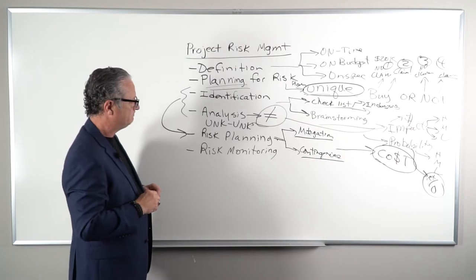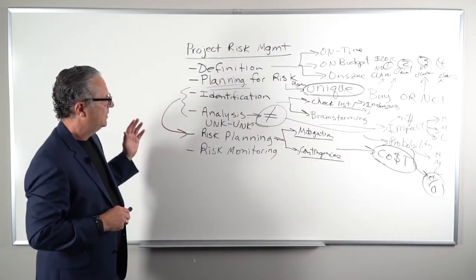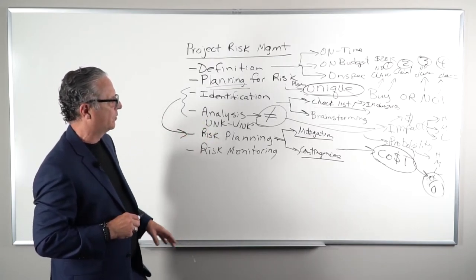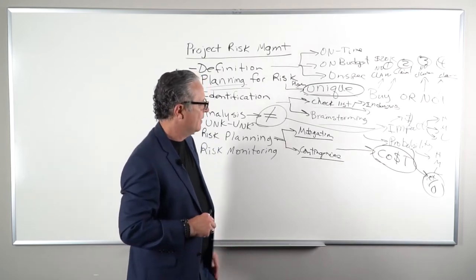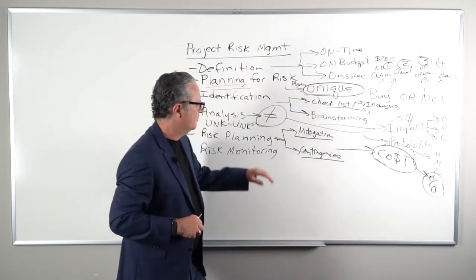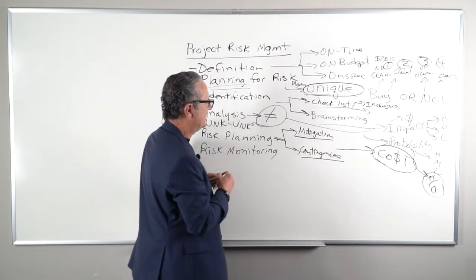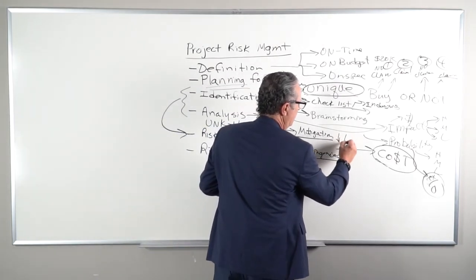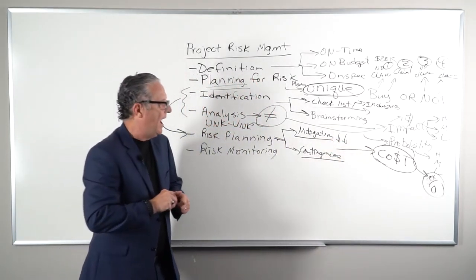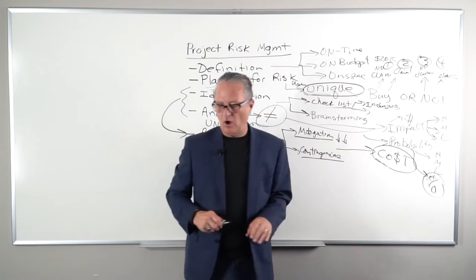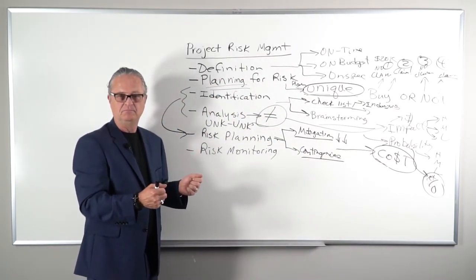So those things happen. The other problem we have is, let's assume we're in a situation where we're willing to mitigate the high impact and the high probability, and we're going to put money at it to either do mitigations or contingencies. Well, what is a mitigation versus a contingency? A mitigation is an attempt to reduce probability and or impact. A proactive spending. Now, what do we call insurance? When you get a bill, what does it say on your bill? It says premium, right?